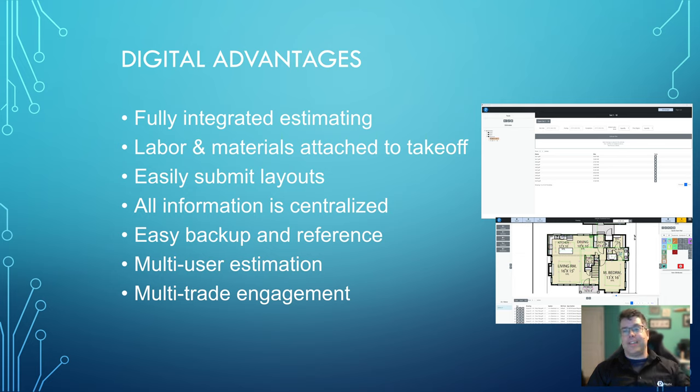You've got everything attached back to your takeoff. So in a properly integrated environment, if it's marked up on the drawings, it is in the estimate. Everything is linked back to the source material. And that makes such a huge difference for auditing, for understanding what's gone into the estimate, and for turnover.